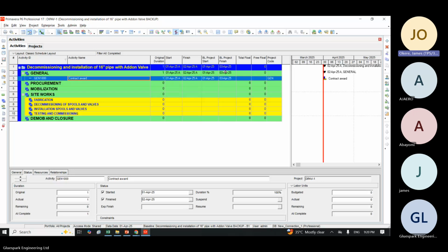Do you know that these guys started the execution from January to December? I joined them that December. So when we evaluated, they had completed 76 milestones. They planned 72, but completed 76. But out of these 76, only 21 were from the plan they had made.